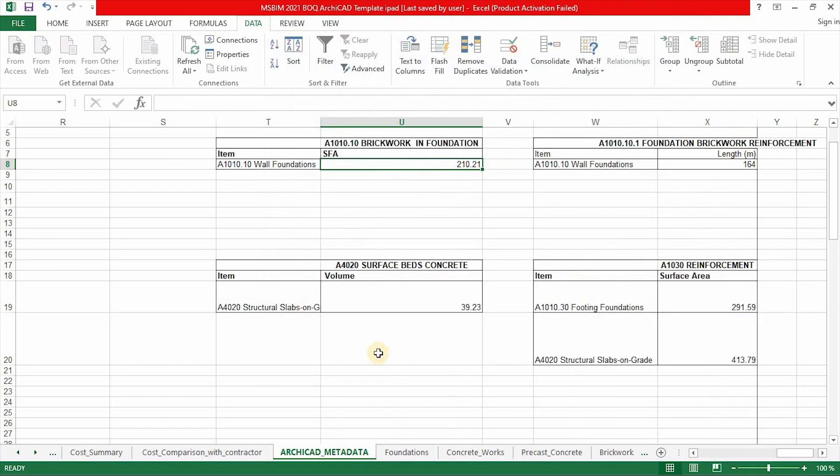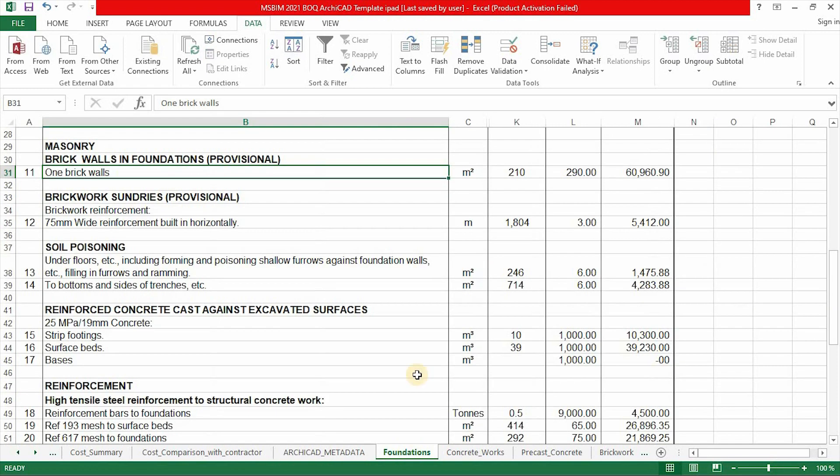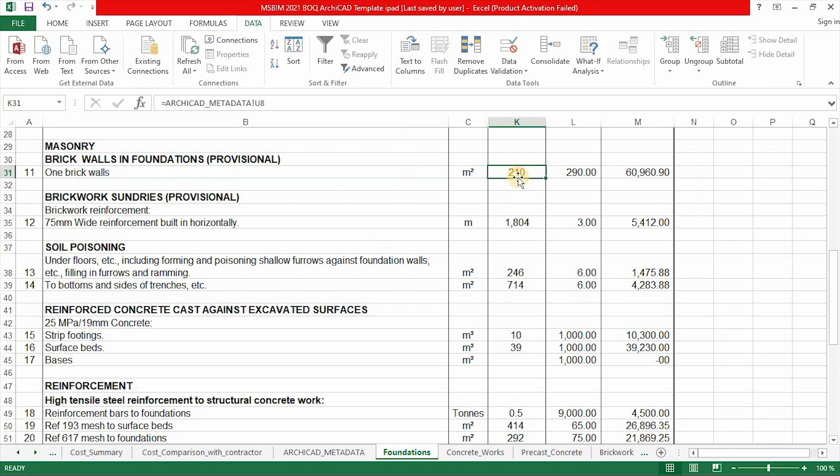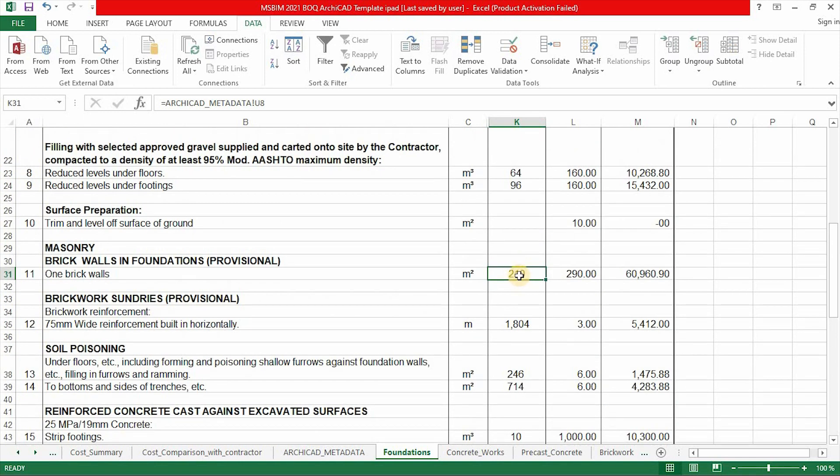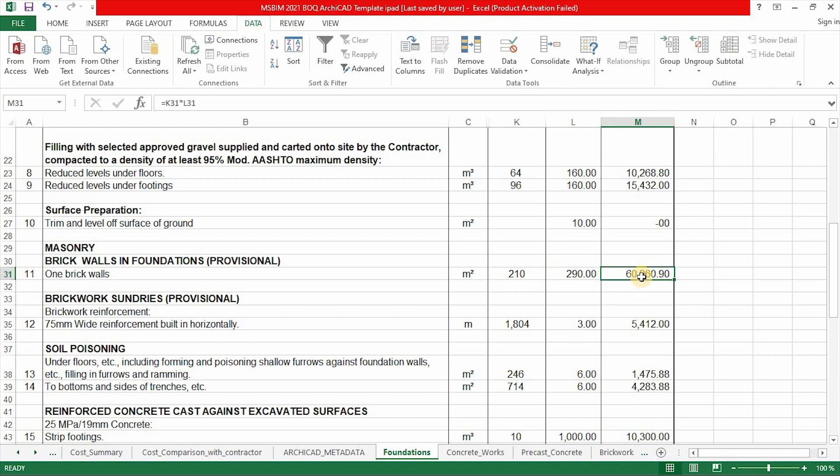There we go. The information is being updated. And then if you go to your foundation report, under the brick walls in foundation, this is the surface area of the total of all the walls in the footing or in the foundation. So the rate is 290. So this is the cost, which is the rate multiplied by the area, the surface area of this brick.